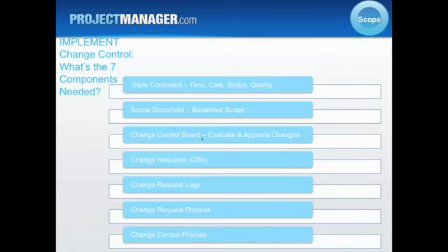And depending upon your company or your organization or your project, you may want to track additional things. But again, it's managing the change requests, more importantly to make sure we've captured the change request, we've acknowledged them, they've been submitted to the change control board or they haven't, but it indicates the status, and what was the ultimate decision on this change request.